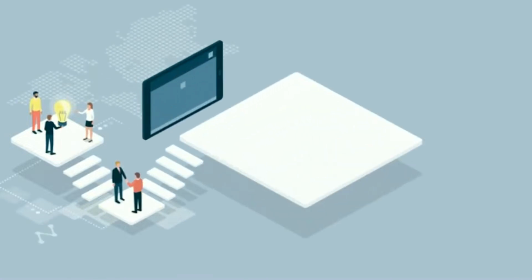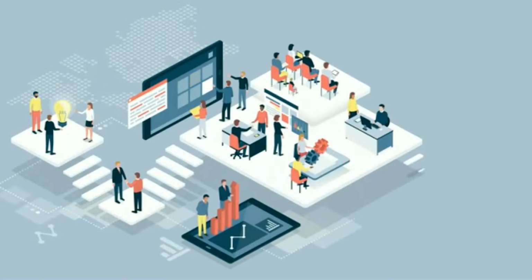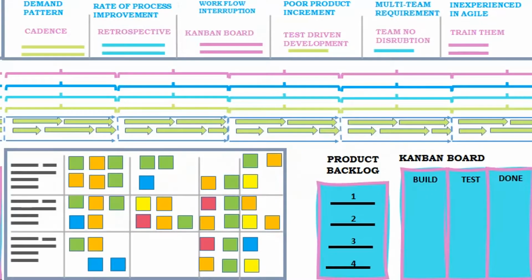Daily stand-ups. Teams use stand-ups to micro-commit to each other, uncover problems, and ensure the work flows smoothly through the team. Time box the stand-up to no longer than 15 minutes. The team walks the Kanban or task board in some way, and anyone from the team can facilitate the stand-up.